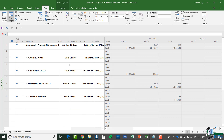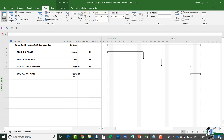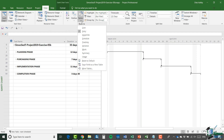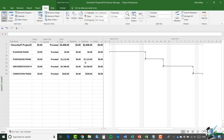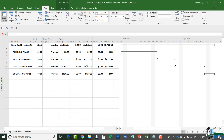Now you can see the cost profile of the whole project starting to develop. I want to go back to the Gantt chart and do something else we haven't done so far. Apart from changing the view, you can change the specific table shown on the left-hand half. On the View tab in the Tables drop-down, instead of selecting the Entry table, I'm going to show the Cost table. The Cost table shows a breakdown of cost for my project at the selected outline level — for each phase I have a total cost, a baseline cost, a cost variance, and an actual cost.